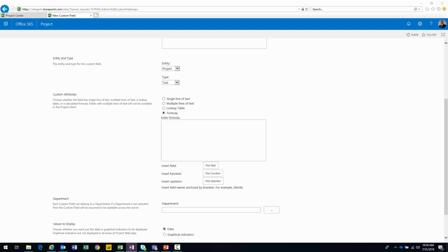And rather than you watching me type this, we're going to paste this in. Okay. All right. So let's talk about this formula, right? Notice what it does. It says if PRS underscore T, therefore it's evaluating that text field, equals 1, the task is complete. If PRS underscore T equals a 2, output it's on schedule. If it equals a 3, it is late. If it equals a 4, it's a future task, which means it shouldn't have started yet, right? So we're going to give that a white dash.